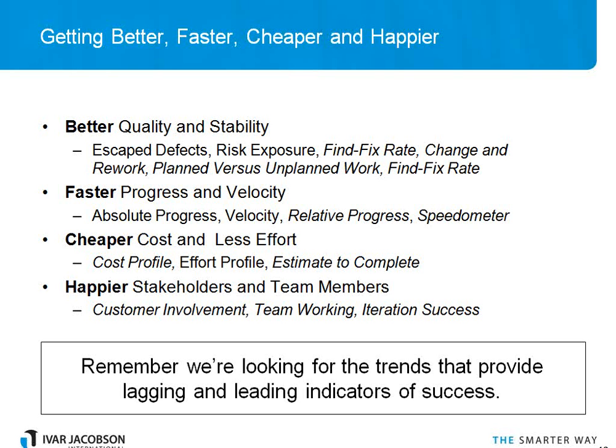The cheaper, it's important that you keep an eye on cost and effort. And the one we're going to look at here is effort profile. This is because for iterative projects, the main thing that we can control is our use of people and resources. We should always have a cost profile, but that tends to be tied into the organizational reporting cycle more than it is to the iterative cycle. There's also lots of other things in the cost profile like license costs, capital costs, one-off hardware, etc. The effort profile is something we can use to steer the project on an iteration by iteration basis.